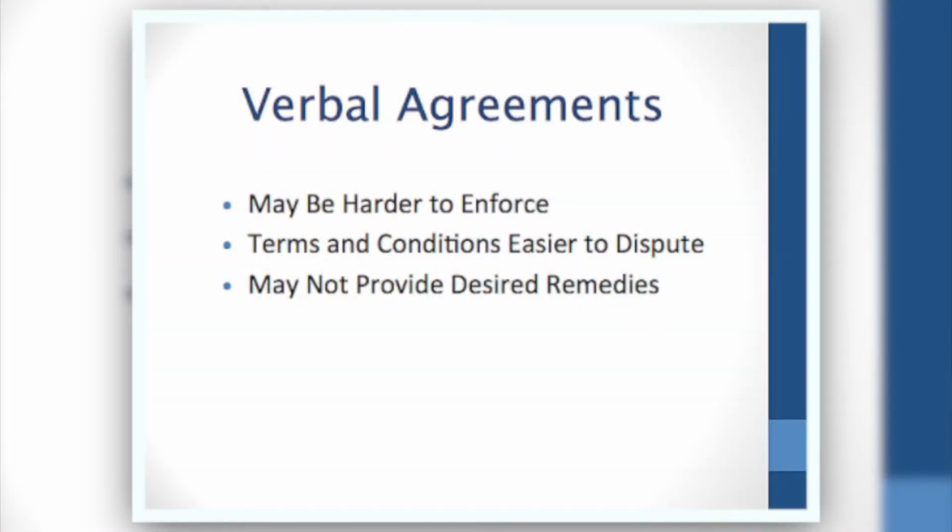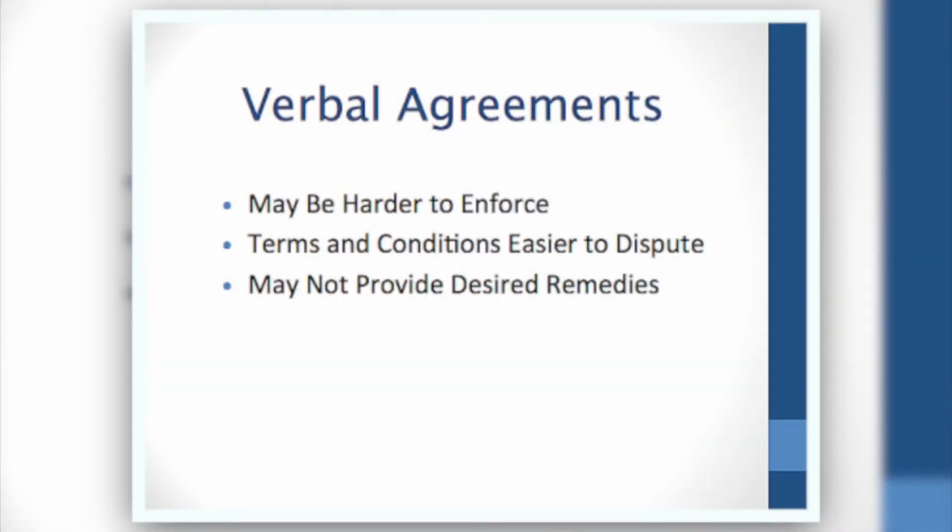Now, when we talk about contracts, a lot of people are going to be thinking about the written document itself. But there can be verbal agreements, and a verbal contract is supposed to be just as enforceable as a written contract, but truly it may be harder to enforce. The terms and conditions are easier to dispute just because of the fact that they were verbal and the parties may have differing recollections as to what the terms of the agreement were. And it may not provide for the desired remedies.